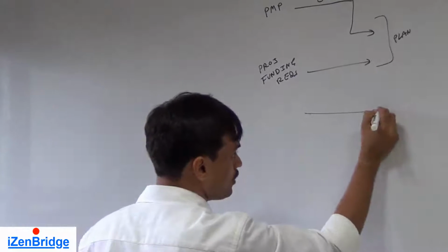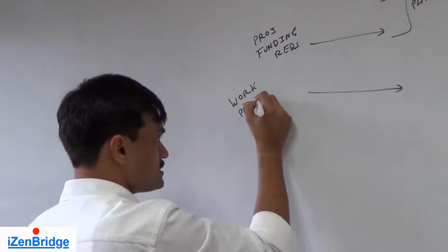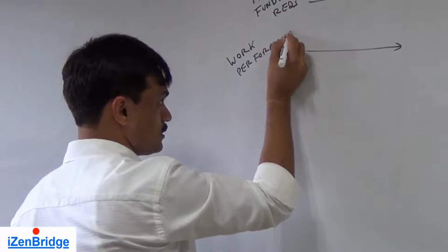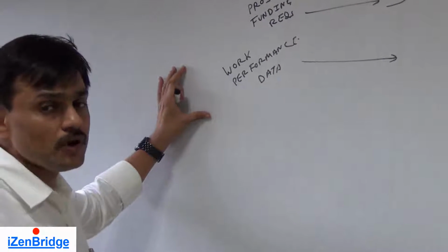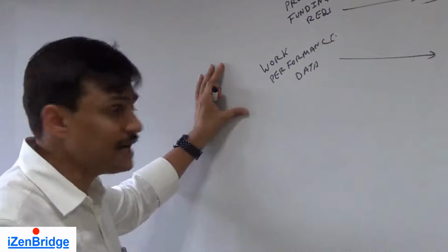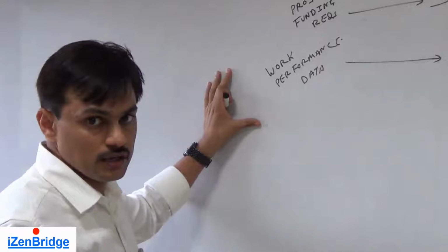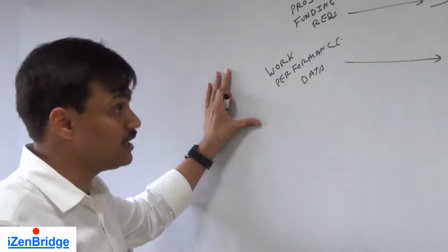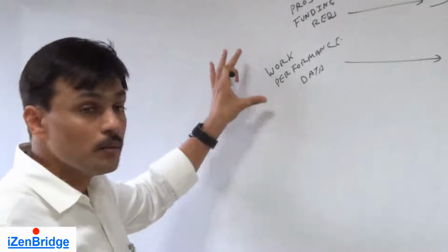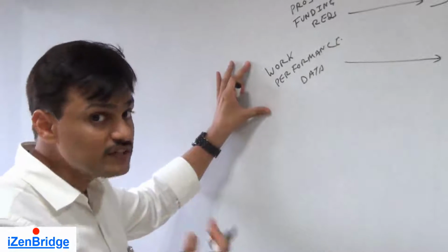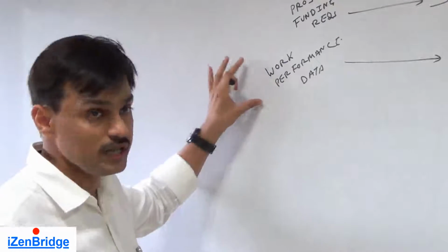Actual is coming from work performance data. From the execution process, we get this, and this data has real information about the actual costs. The day-to-day expenses you are making in your project are getting to the control costs process via work performance data. Even the procurement related expenses are also coming through this only.